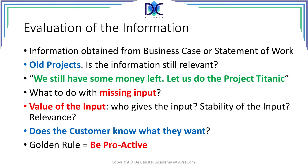Another problem that project managers tend to have is missing input. You get the information, but the most important or essential parts are missing. How do you get that information? Nobody answers, nobody replies to your emails. What do you do? Well, you fill it out yourself. You say, 'I didn't get any information, but I think this should be relevant — please agree with it.' I assure you, within the hour, you will have a reaction back with the correct information.